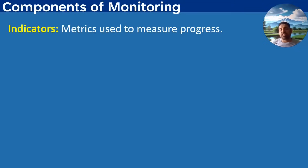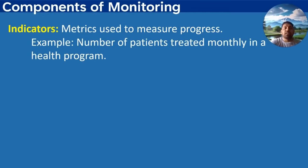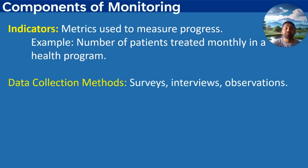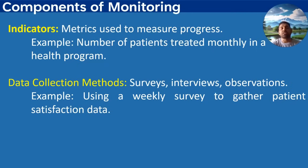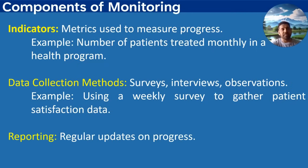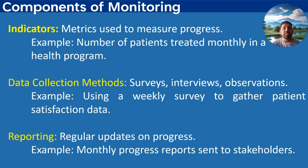The key components of monitoring include: indicators — metrics used to measure progress, for example the number of patients treated monthly in a health program; data collection methods such as surveys, interviews, observations, or routine data collection, for example a weekly survey to gather satisfaction data; and reporting — regularly updated progress reports, for example monthly progress reports sent to stakeholders.